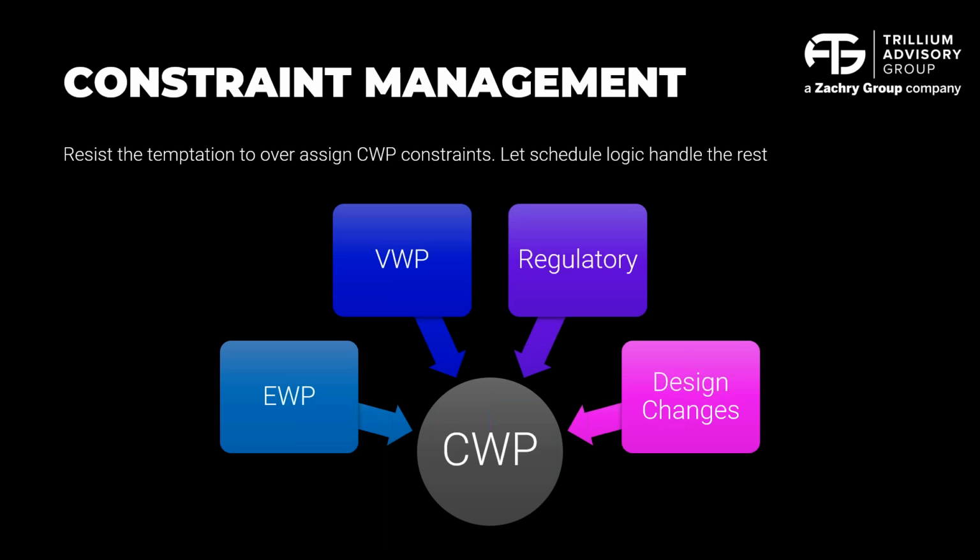So the next one is, you and I can tackle this one together. Implementing AWP at an EPC, do you ever worry about focusing too much on building packages and losing sight of execution? I think that's a fantastic question. One of the interesting points about the use of digital solutions in the industry is there's so much automation capability, right? And you really take a lot of the manual work out of the packaging exercise. But sometimes that automation can push some bad behavior as well, right? You can see packages being built quite quickly and scoping being done quite quickly. And sometimes people are focusing so much on just getting things packaged out that the execution details can be missed.